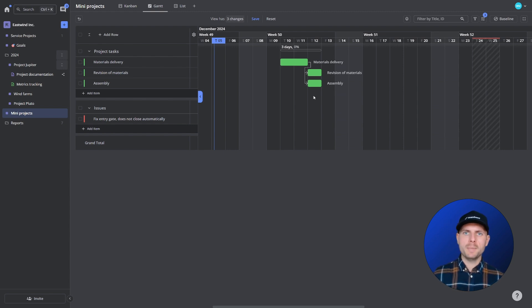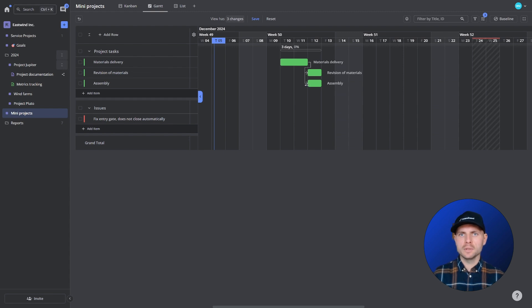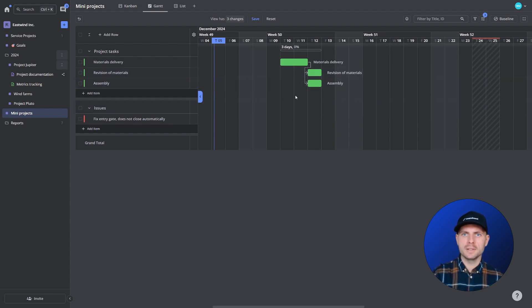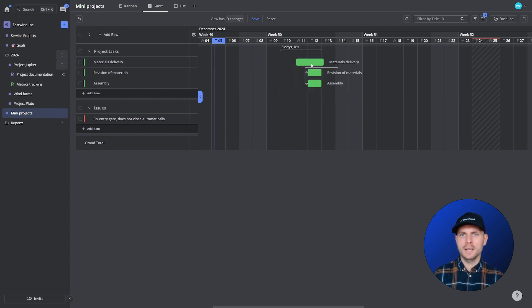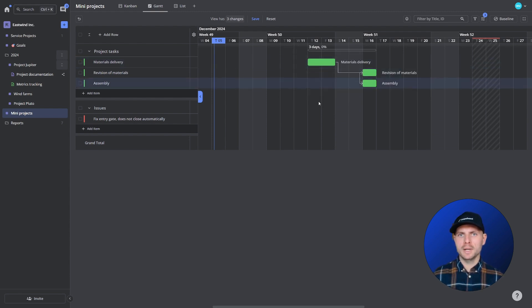And these dependencies as I said are future proof. So if my material delivery gets delayed I will push it forward and the corresponding items will react.